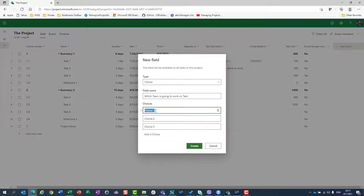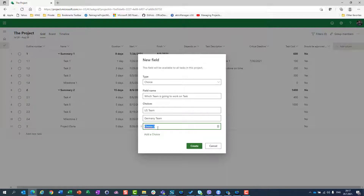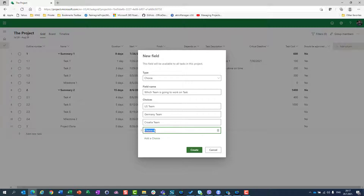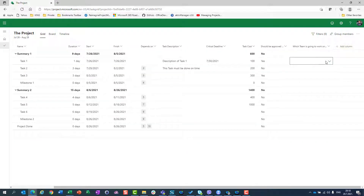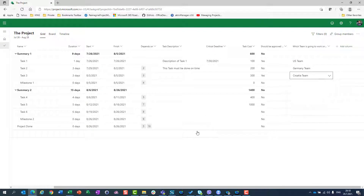Let's say I have US team, Germany team, and don't forget my country — Croatia team. I have three choices here, and I can add a fourth: Canada team. I will create it. Now I can go here and simply choose which team should work on which task.